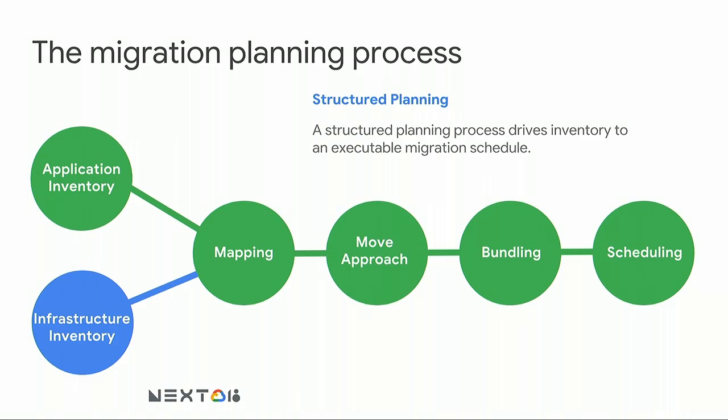And again, that's both the application to server, which is one part of it, but probably the more important and more difficult part is that application to application mapping. You have to understand those interfaces so that when you pick them up and move them, you move the same thing. You move the highly coupled applications together at the same time and maintain that end user usability.